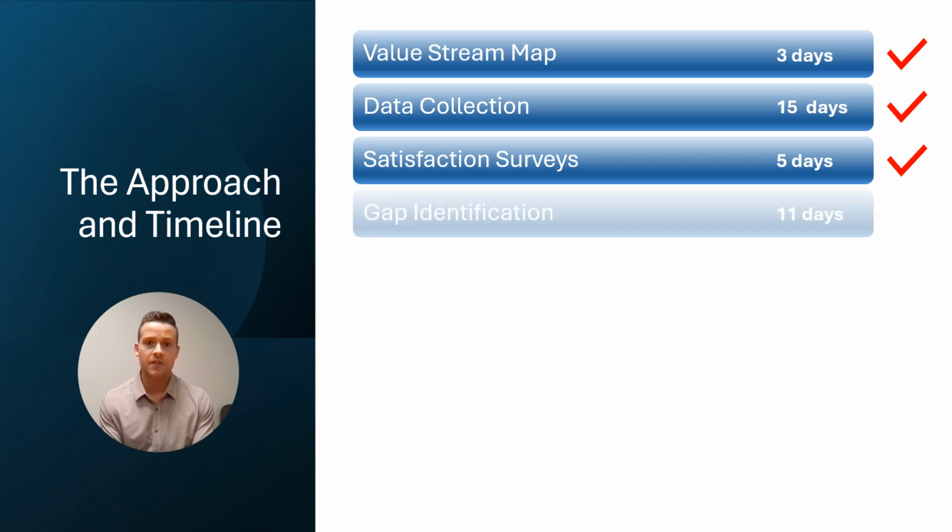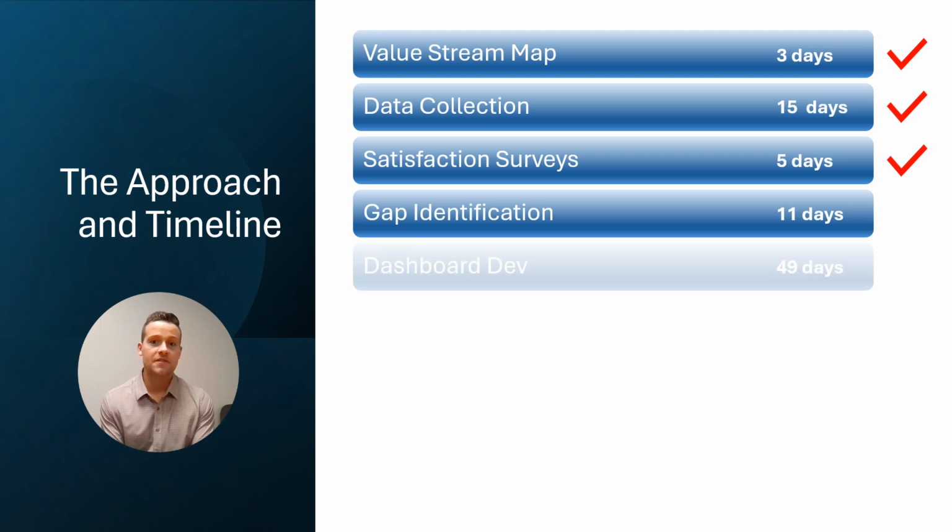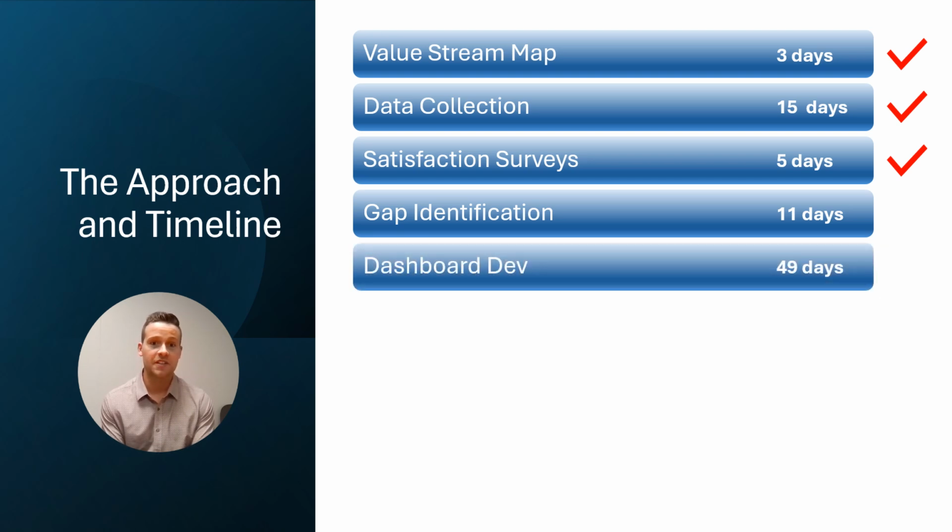Mapping data sources for the Tableau dashboard and meeting with the tech integration team to share design and requirements will take 2 days each. The tech integration team will develop the dashboard over 2 months. During this period, a small number of suppliers will be selected to test the dashboard, and a cross-functional team will assess its efficiency and accuracy over 1.5 months.